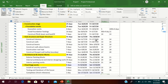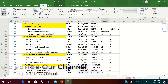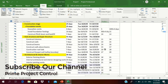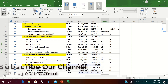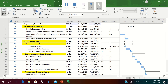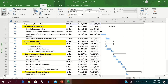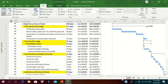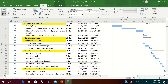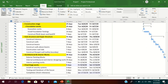There are different variations in relationships — we can add or modify lag values such as Finish-to-Start minus 4 or 5 days. I will move the vertical splitter bar and hide the predecessor and successor columns. We are now almost done with inserting all the activities.